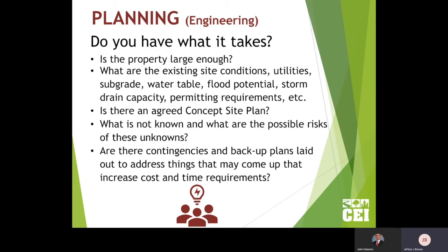This all comes together into a concept site plan, and this is critical. It's a drawing that is concise. It's AutoCAD based, where we know things are going to work down to the square inch, you might say. But it also helps everyone have a meeting of minds of what we're going to build. Is it going to be functional? Is it going to have what we want it to have, do, and be? So once we have that concept site plan in place, we're really ready to proceed.